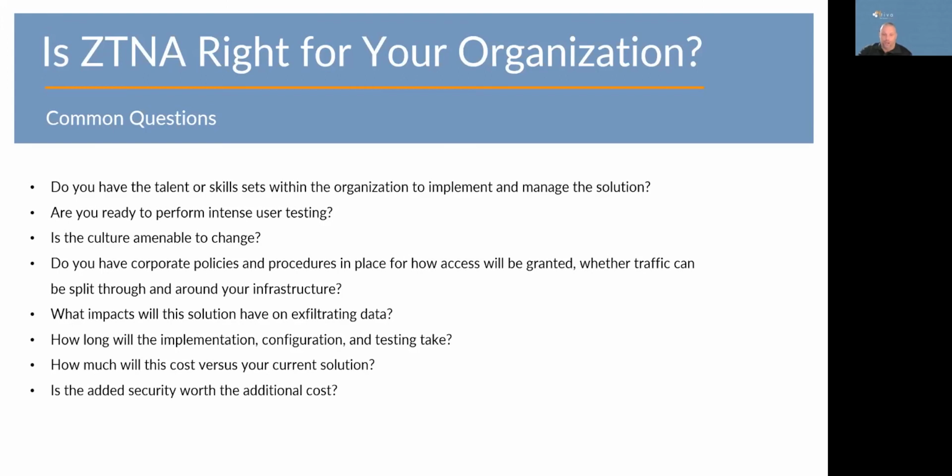And then what does this cost versus your current solution? In some cases, the cost of this new product may be comparable, but with all of the training, the user testing, the professional services engagements, et cetera, the total bill for this new solution could be astronomical compared to your current solution. So again, this is where it becomes a business decision. How do you balance security versus the cost? Do I double my budget to get X percentage better security?